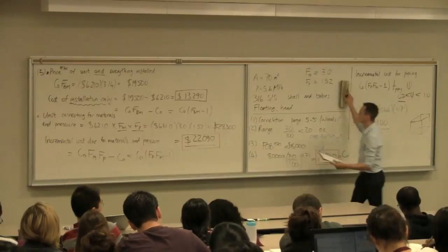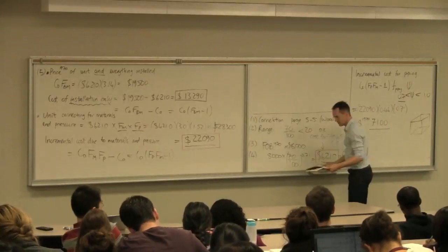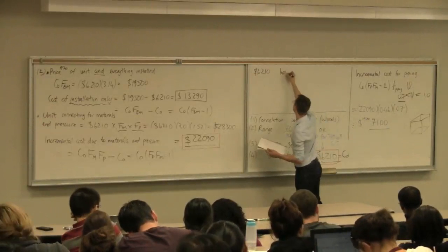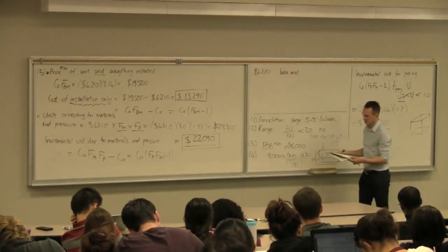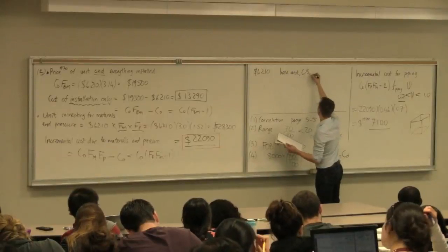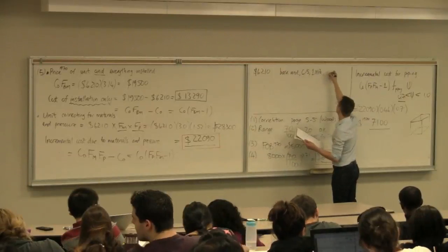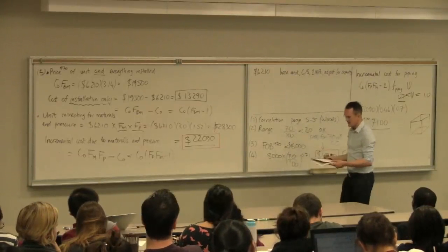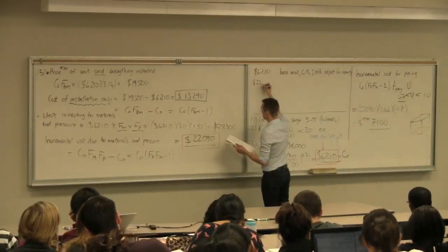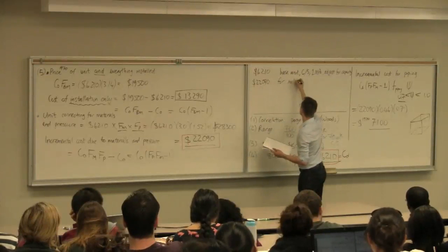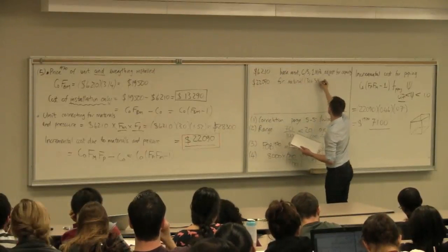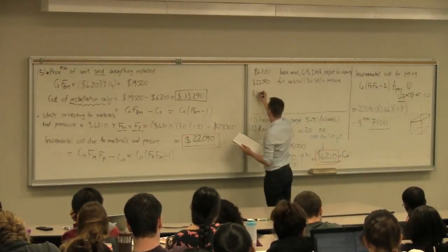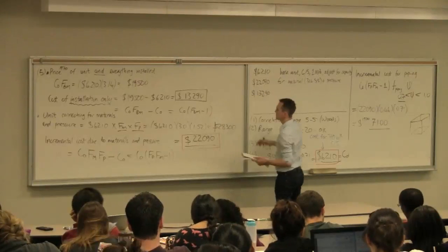Okay, and now I'm in a position to finally tally up all the costs and get a bare module estimate here. So the first one is we're paying $6,210 to the vendor. This is for the base unit. So this would be something like a quotation that would be made up for you. So the base unit made from carbon steel, operating at 1 MPa, and we've already adjusted for capacity. Then we're paying that vendor as well an incremental $22,090 for materials and pressure. We're paying $13,290 for installation only.